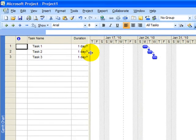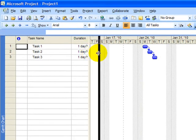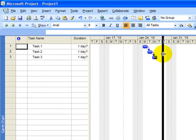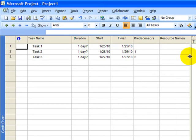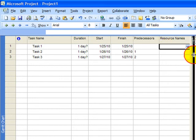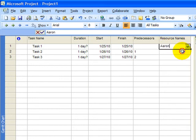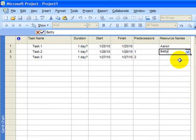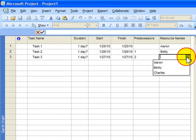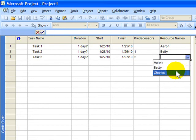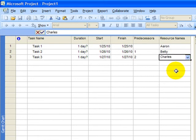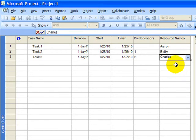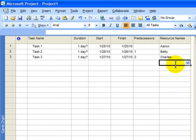And as I said, you can change the split bar here and you can see where there is a column for resource names, and you begin to choose the resources. Now some people will not have specific names for their resources, they'll have specific job titles: project manager, project coordinator, accountant, marketing department. Those are all fine examples of resources, but you assign those resources to your project so you can see their names here.